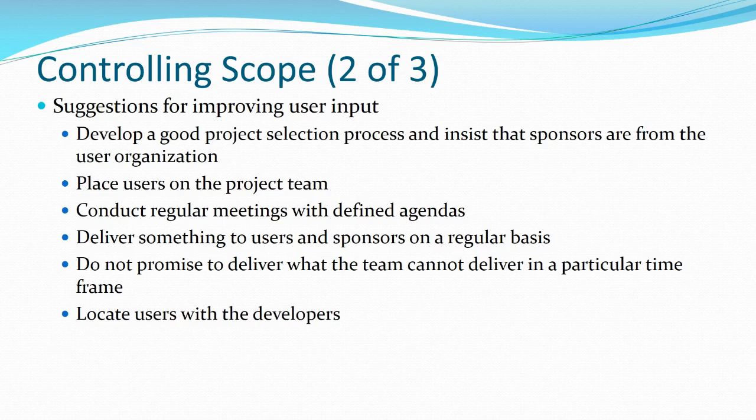the sponsors. If we need to make, let's say for example, we're breaking ground on a new building, and we decided that the size of the building is going to be 600,000 square feet, and all of a sudden we've discovered a rock wall that we need to remove to be able to go forth, and all of a sudden we've got to reduce the size of the project, we've got to reduce the scope, or pay several $1 million to remove the rock wall we discovered. That's something your sponsors need to be involved with.